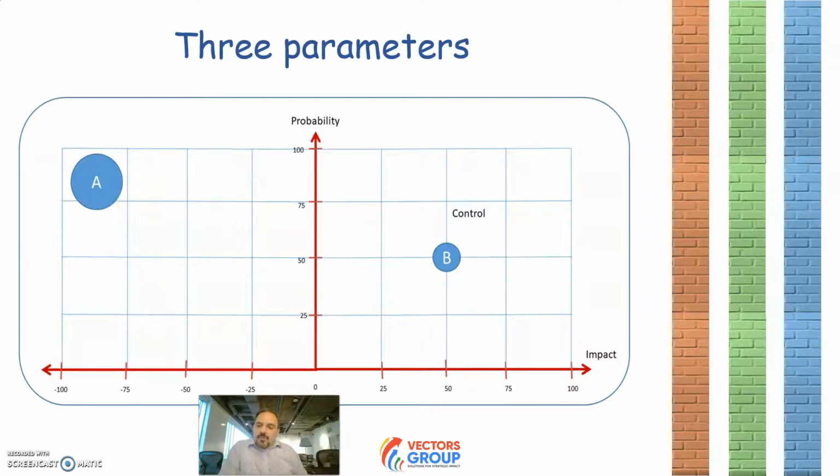So imagine that one of your specialists is planning to quit her job and move to another company or organization. So the probability is very high. You can see this, okay? And maybe she even told you that. And the impact will be severe, very highly negative, because she's the only specialist in your organization.